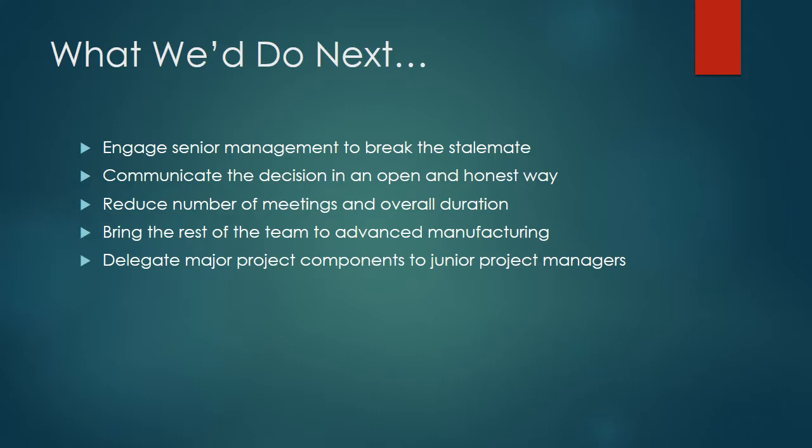Bring the rest of the team to advanced manufacturing so you can have the whole team co-located. Obviously there were union laws restricting advanced manufacturing from being in the Chrysler building, but is there a way to bring everyone else to advanced manufacturing? And finally, we delegate major project components to junior project managers. Jack Smith would still be the main senior project manager, but he'd delegate and divvy up some of those other parts, break them down, get specific people to lead those parts.